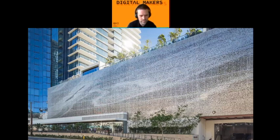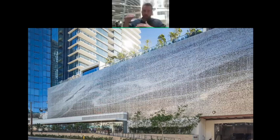Yes. And usually with those contracts, we're going to try to get to a mock-up. We'll build a physical sample of the thing we're trying to get to, which always helps, especially when you get to ownership groups for final approval. And then we're also getting to a price that we can build it for. It's not meant to be an advantage to us necessarily, it's an advantage to everyone. It's trying to optimize that design to something that is feasible: it fits in an owner's budget, fits with the architect's design intent, and is fabricatable.